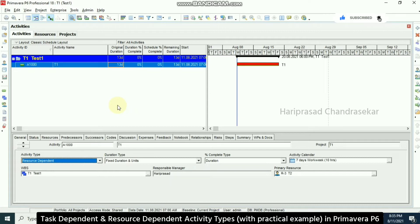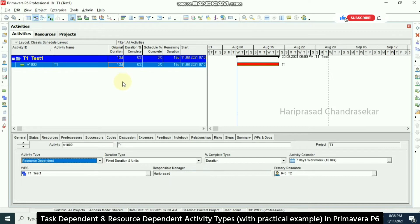Task dependent activities depend only on the task calendar — whatever the resource calendar is, it won't be considered. But in resource dependent, it directly uses the resource calendar. That's why we are getting a longer duration here. This is the difference between these two activity types — understand these things and make use of them in your project.